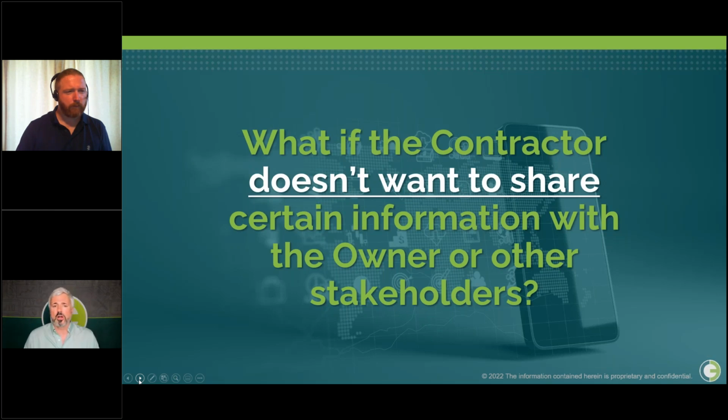And we heard Jerome talk about this a little bit in the video from Shell, which is, they've eliminated the need to have multiple systems, and the contractors can be working inside the same system as the owner and the EPC, and the EPC is releasing packages for the contractor then to go and build installation work packages off of. So there can be a release process within the tool that allows you to keep that information segregated as needed, so that you don't have contractors working on information that's not fully complete.